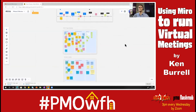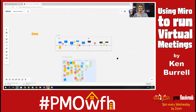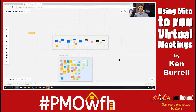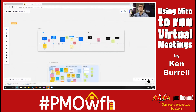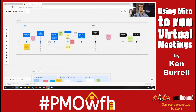This is what I ended up doing. In a retrospective session that John led at Ticketmaster, he showed us a great way of starting a retrospective by visualizing the project as a timeline. So I used the journey mapping template to create this timeline. The idea is you have a timeline of the project with milestones marked and you can add sticky notes to it. Different people who are signed in can add sticky notes, but you have to invite people to the board and they have to create an account.